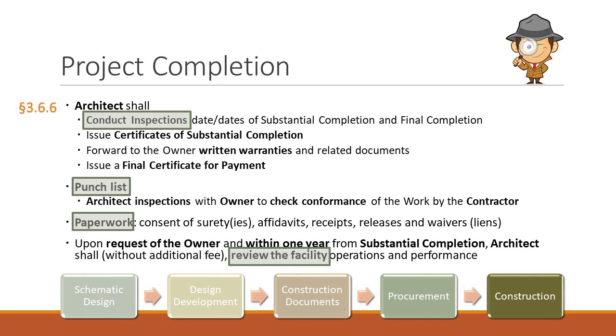And while, if you remember, there was a provision that said your construction phase services end at certificate of final payment, which if you remember in the previous slide, or 2 slides before, you just issued, that issue of final payment, you still contractually have to come back for one more meeting to walk the site and make sure that everything's as it should be. The number of times an architect does this is very rare, but it's in the contract that you can do that and you don't get paid for it. So that's that one last time.